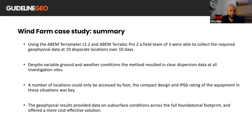Using the TerraMeter LS2 and TerraLock Pro 2, a field team of three were able to collect the required geophysical data at 19 fairly disparate locations over a space of 10 days. The data collected provided dynamic estimates of elastic moduli, which are not possible with standard penetration tests alone, and it was possible to undertake a joint inversion of the SPT and MASW data. Two-dimensional arrays provided a greater understanding of the ground conditions across the entire foundational footprint than would be possible with just the one-dimensional measurements available at the borehole locations. So these geophysical methods were more cost effective than utilizing multiple boreholes per pad foundation, for example.